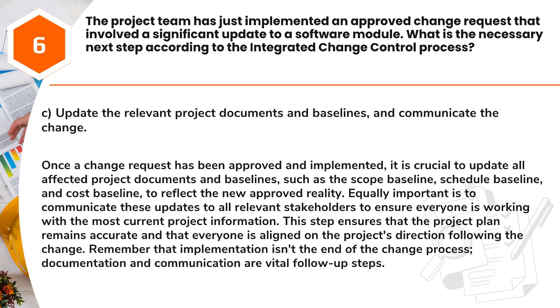Equally important is to communicate these updates to all relevant stakeholders to ensure everyone is working with the most current project information. This step ensures that the project plan remains accurate and that everyone is aligned on the project's direction following the change. Remember that implementation isn't the end of the change process. Documentation and communication are vital follow-up steps.